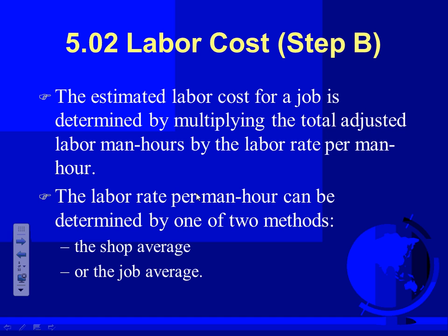How much money you spend on all your crew, one of your crews, right? And you add all the money and divide it by how many people you have and how many hours they did, and that will get you a dollar value. So that came up with $35 per hour. So keep track. Did you guys hear me? Keep track of all your labor for 6 months, divided by how many people you have, by how many hours.